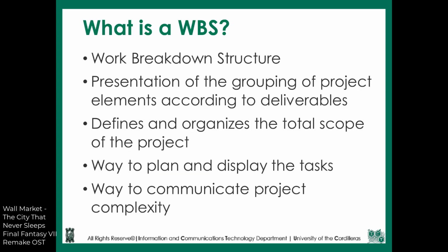The work breakdown structure, or WBS for short, is a presentation of the grouping of project elements according to deliverables. In a project, what really matters is the deliverables, or the main outputs of the project. Dividing the work according to those is one of the most logical ways of dividing work. However, in some cases, there are some important tasks that may not be directly related to the deliverables, so other structures can be used aside from the WBS. Anyway, the purposes of the WBS are as follows.